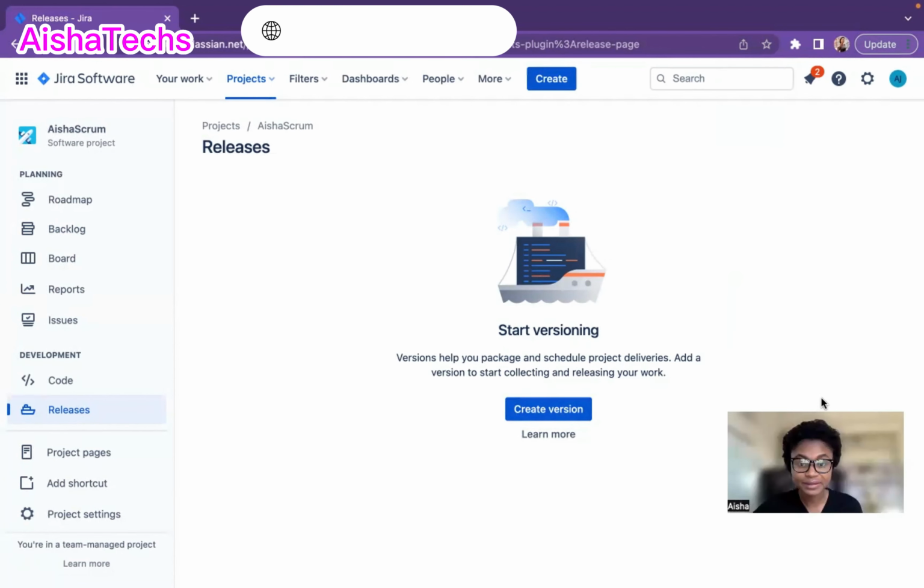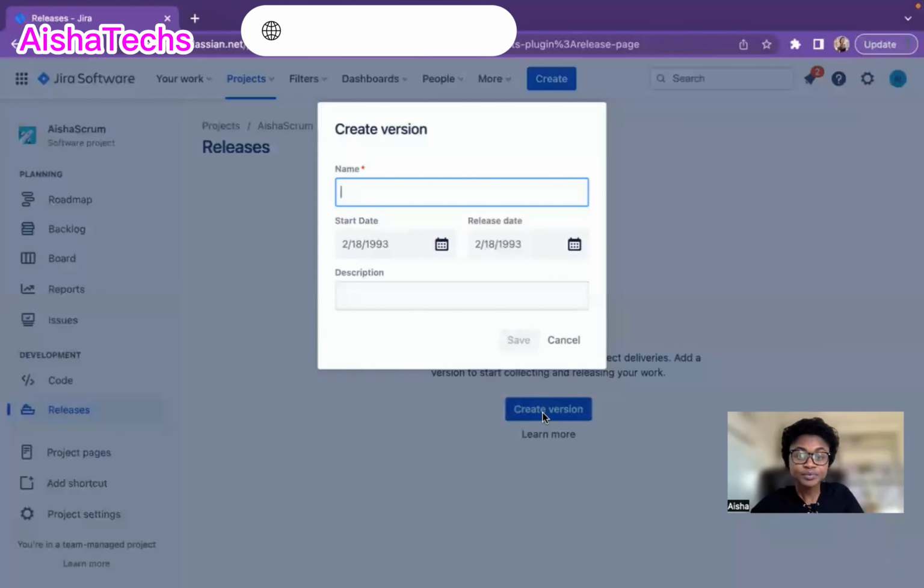All right, so to create the version, I'm just going to hit create. When I create, it's asking me for the version name. I like to use volumes, because sometimes when we are releasing, it has multiple steps, and we leave some parts of the increment from sprint to sprint. So I hit V for volume, volume 1.1. That's the name of this release. But to be honest, you can name it anything your team likes, or anything you think is right based on what your team agrees on.